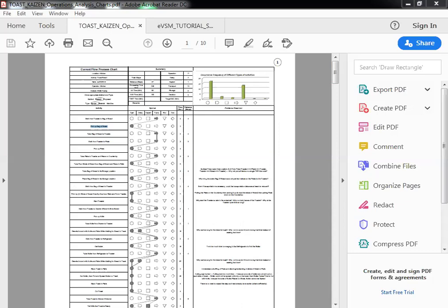And that is why you'll see in the future state, he's doing things like loading the dishwasher, starting the dishwasher, then going and cleaning the sink and other things like that. So a lot of scheduling is intended to minimize the total wasted time of the resources, like the machines and the operators, and the working process, which is for the products. So the Gantt chart is the best representation available to take the flow process chart and timeline it to understand where different tools and products are either in a value added state or a non-value added state.